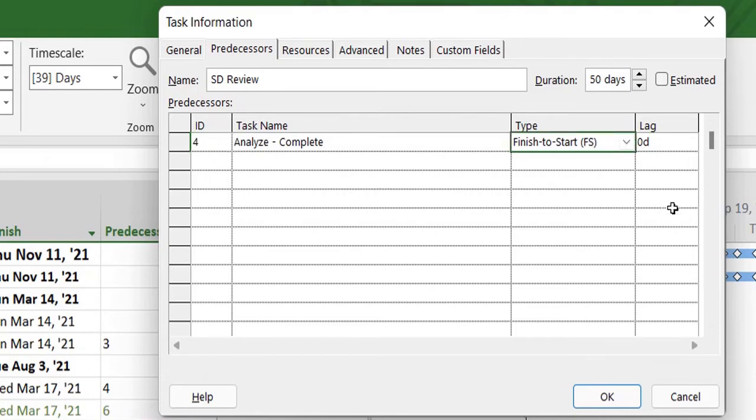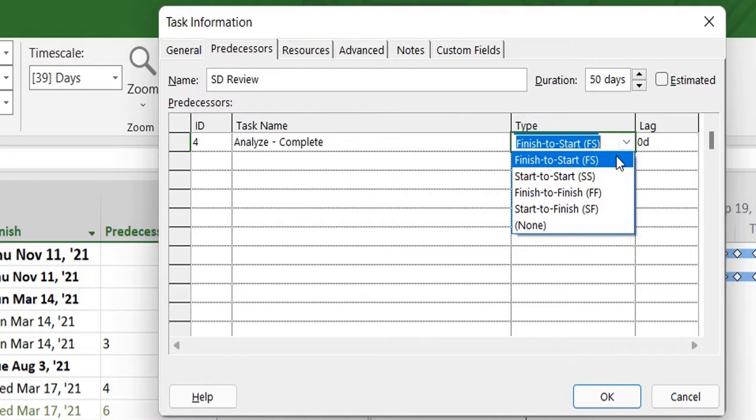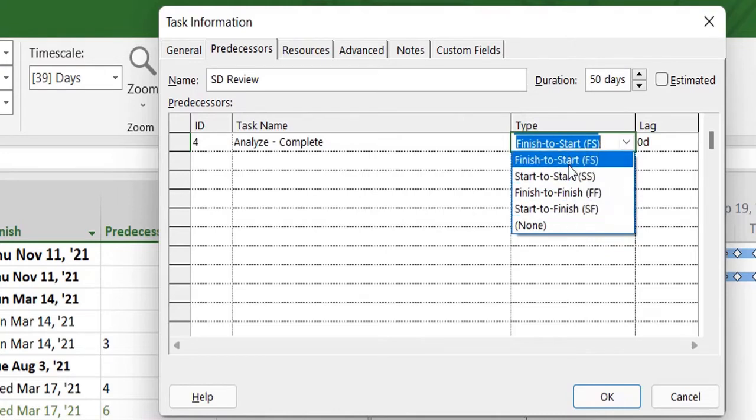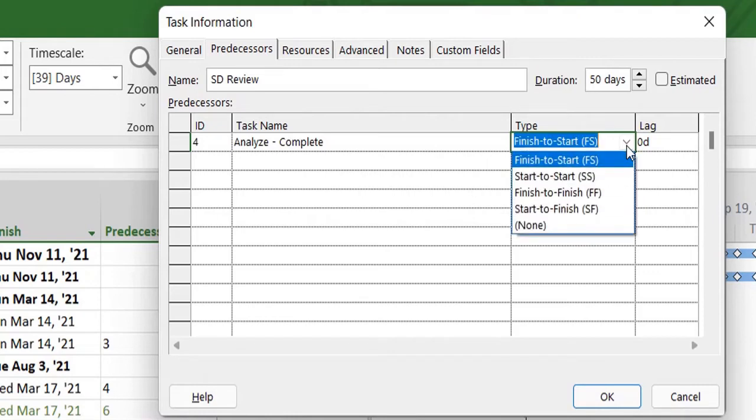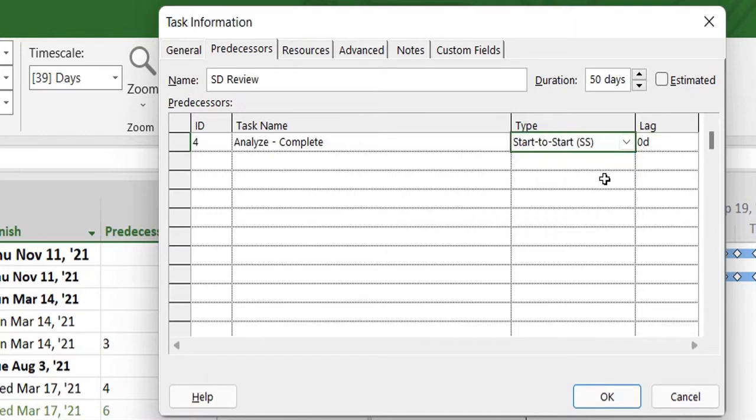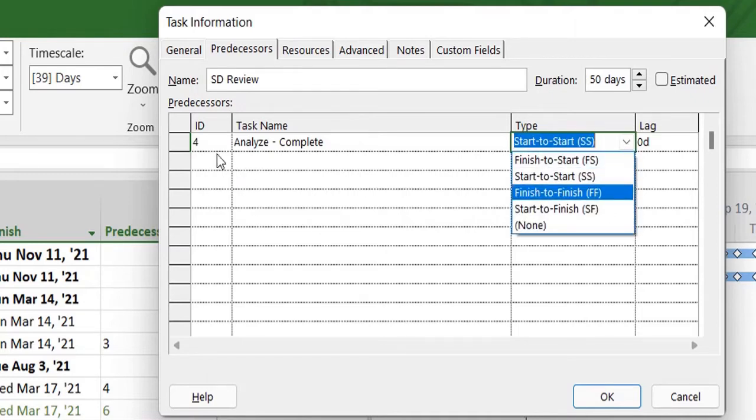There are a few types of relationships that can be defined. Default is finish-to-start, which means when a task finishes, then this particular task will start after that, not before that. Second is start-to-start, that means both of these tasks, task number 4 and task number 8, will start consecutively.